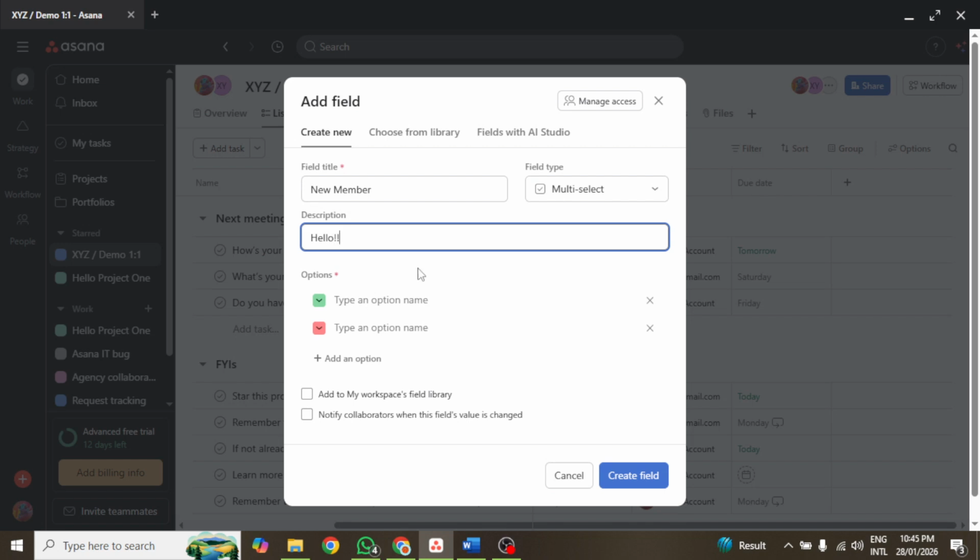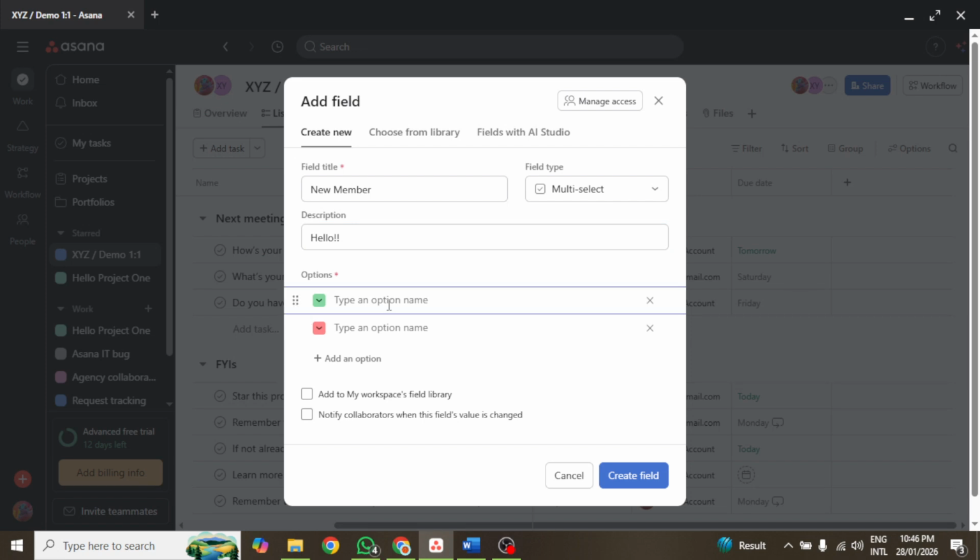After accessing the Fields menu, click the option to add or create a new custom field within the project. You will then need to choose the field type that best meets your requirements. Options include text, number, dropdown, or date. Giving the custom field a clear and descriptive name is important, as it helps team members understand how to utilize it effectively. If you select a drop-down type, you can also set additional options, including the choices available or any default values. Once you've configured the custom field to your liking, save the field to finalize the process.